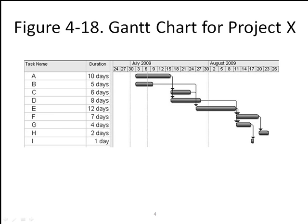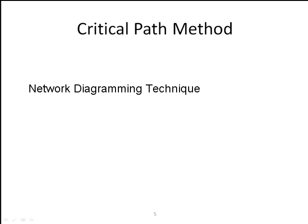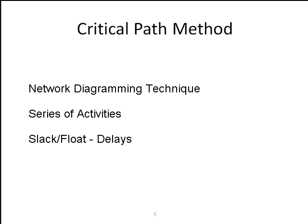However, a more powerful tool to use is called the critical path method. This critical path method is a network diagramming technique used to predict the total project duration. A critical path for a project is the series of activities that determine the earliest time by which the project can be completed. It is the longest path through the network diagram and has the least amount of slack or float.